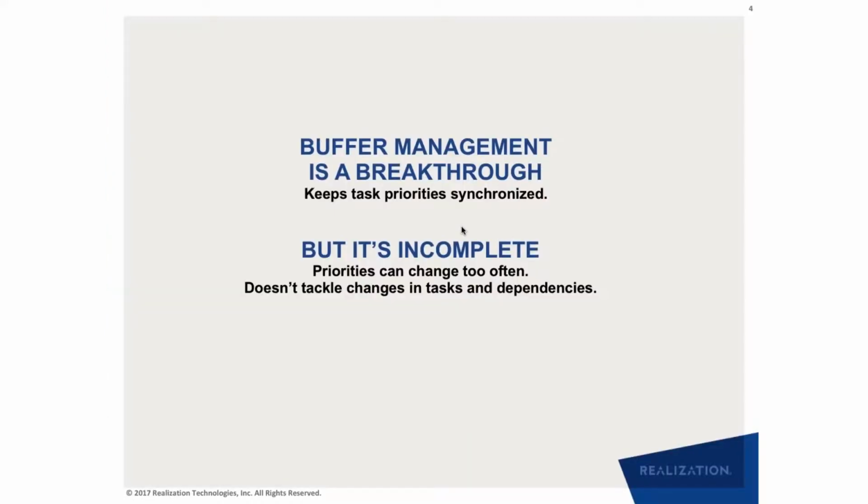We also know that the whole idea of critical chain buffer management was a breakthrough in this regard, but it is my experience and our experience from about 350 multi-project implementations and about 500 large construction projects that we have helped manage or manage directly, that buffer management is a very incomplete answer in terms of making plans useful in execution because of two reasons. One is what buffer management does is that as you report task completions or task progress or the remaining duration on the task, it is recalculating the priorities.